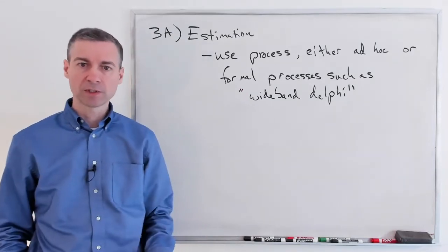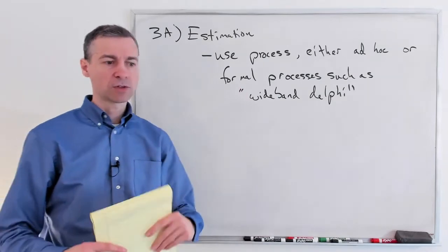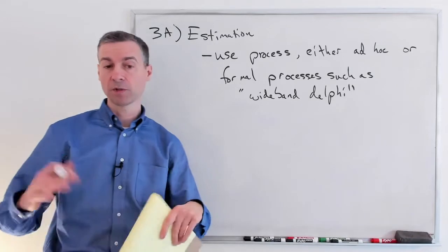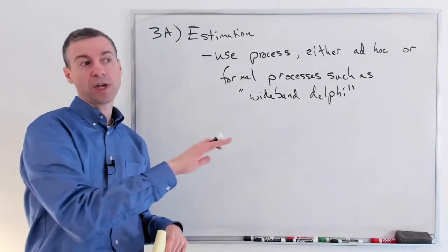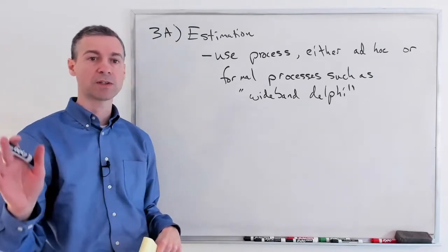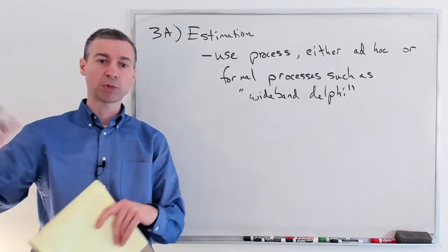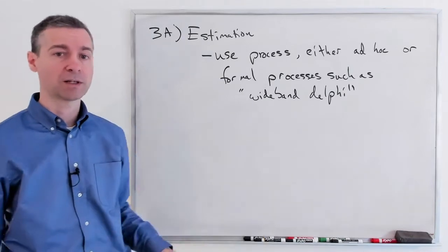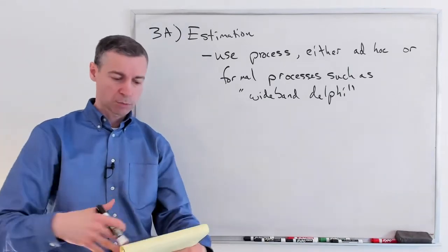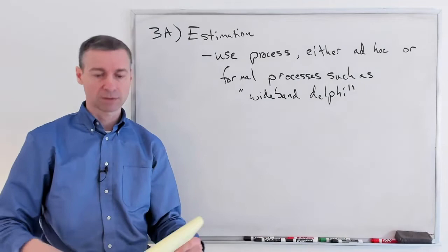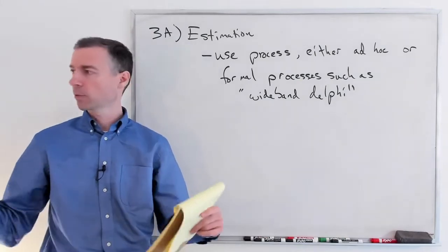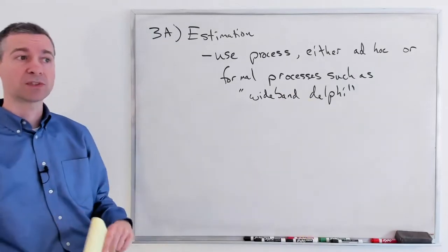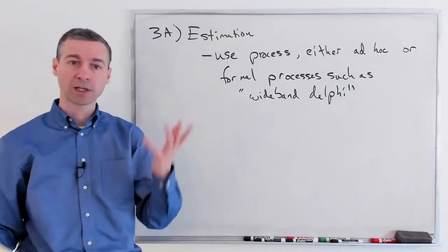have them come up with their individual estimates, and then you show the people in the room, okay, you collected all those and you keep it all anonymous, but you say, oh, we have time estimates from here to there. Oh, we have some tasks that some people have and other people don't have, and you list these. And then you ask them again, all right, now that you've seen all of that, please adjust your estimates. And they change things and they have more discussions. And then they pass those things in and you show again, this is what we see in the room. This is how people are estimating.